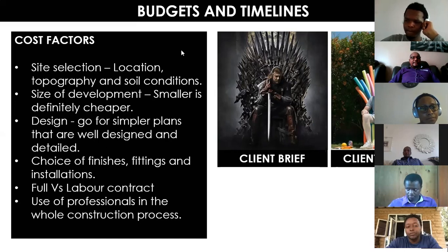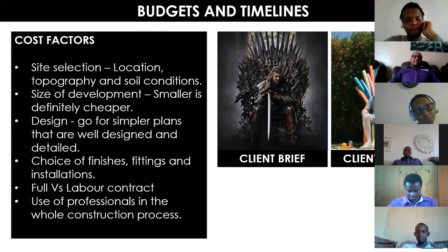Of course, there is the aspect of choice of finishes, fittings, and installations. Roofs have different prices. You can do the usual Mabati that is very cheap, but of course, you compromise on the looks. But then you can do the stone-coated tiles, you can do the clay tiles, you can do shingles, which are some of the most expensive. So you can see how to go about it.